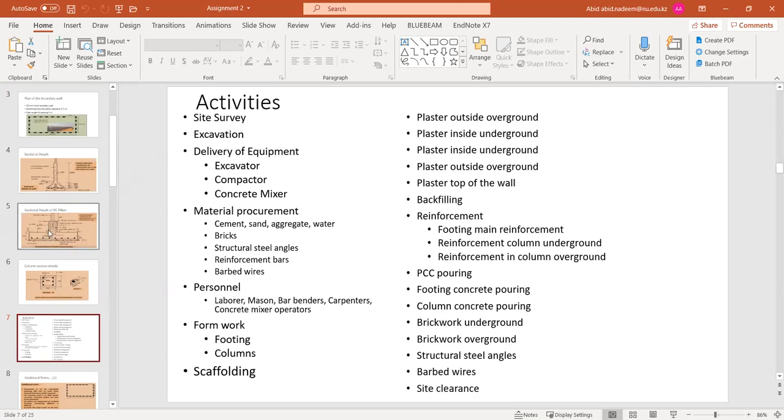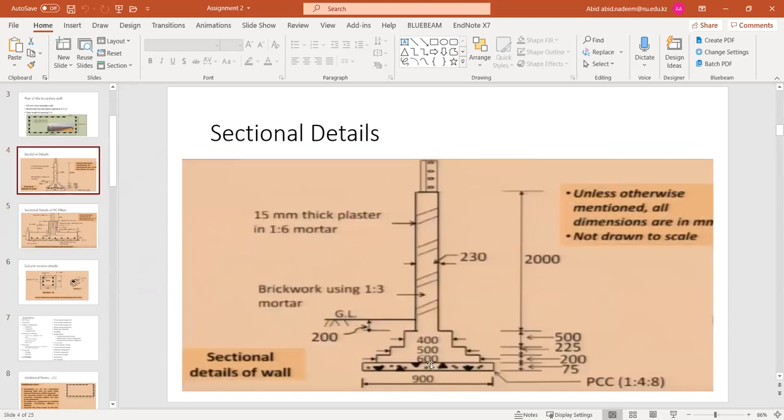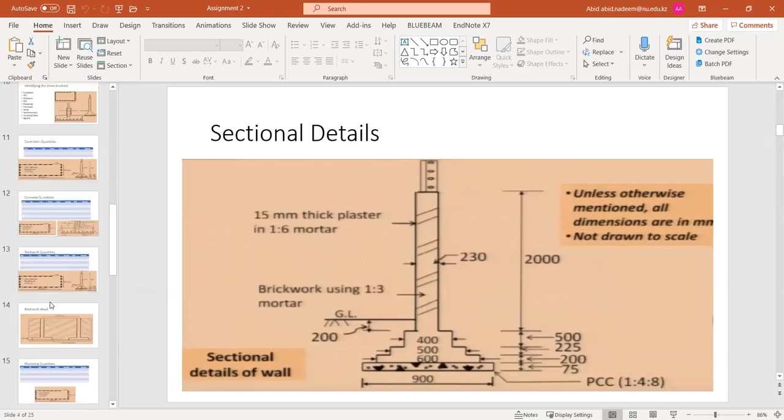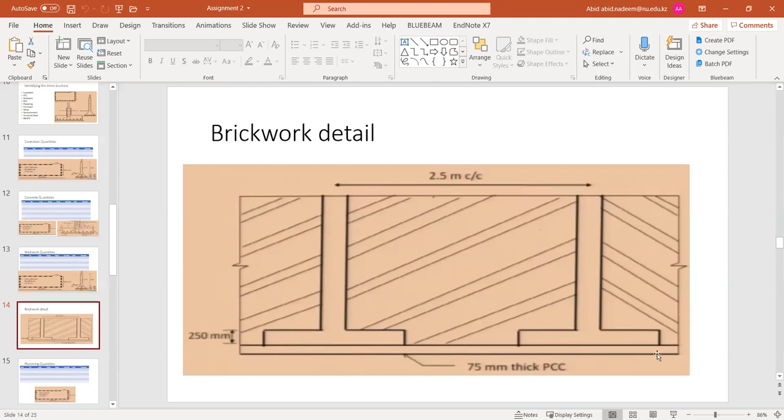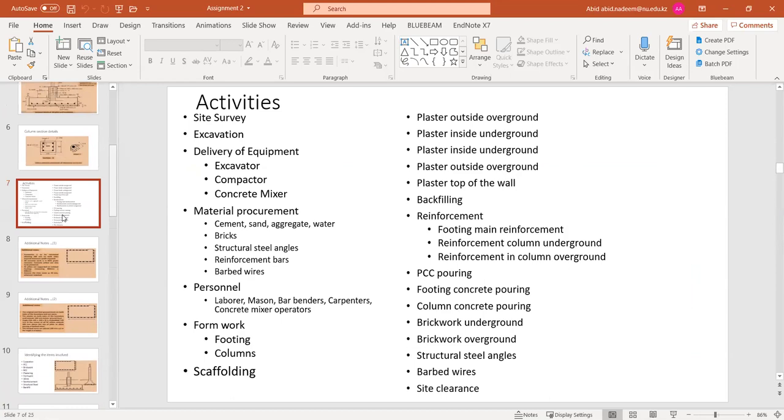If you can see, on the concrete pouring, there is a column footing. Okay, there is this column footing. And on the concrete pouring, there is also a brickwork as well. So for example, here, you can see in this elevation view, you have this PCC poured bed, and then there is this column footing, and in between column footings, there is the brickwork as well. So logically speaking, brickwork and column footing can start simultaneously after the concrete pour, okay? After pouring of the concrete bed.